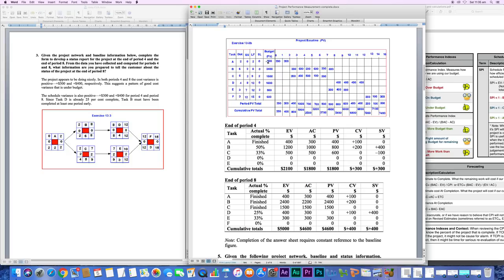And then we distribute this budget in time, also in the planning phase, to reflect how we expect to earn the work from activity A. So this project baseline is given to you. The cost is scheduled and a planner has developed it. The budget for activity A is equally split between the first period and the second period.